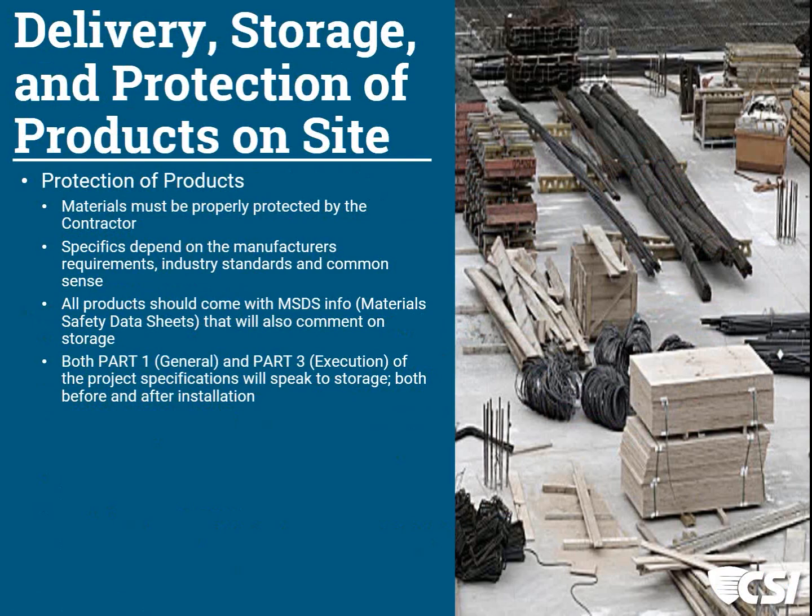Well, if they are in a bonded and insured warehouse, then those would be paid for by the contractor, but would be showing the owner as an additional insured. So it's a great question, and yes, the owner, and that's one of the things that we would look at as a piece of documentation on the project. Well, my owner is listed as an additional insured. That means that if the place burnt down after payment was made, my owner is made whole. If the place burnt down before the owner pays, then the contractor is made whole. So yes, I would absolutely require them.